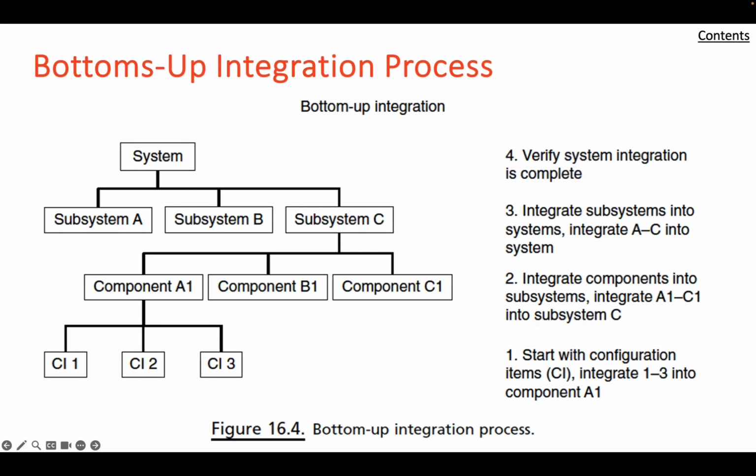This approach requires a system architecture to be followed to ensure that the requisite elements are included in the integration build, which can include fairly well-defined integration tests and exit criteria to determine when the next level of capability is developed.